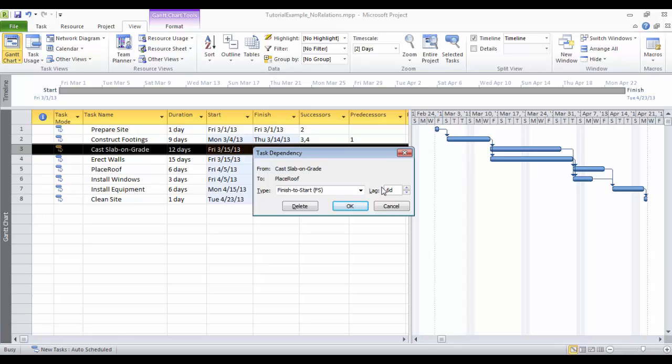Concrete cures on weekends. It doesn't have a break on the weekend; the chemicals keep doing their business. So now we'll add E to it. Elapsed day means it counts both working and non-working days. So let's see the difference between both.